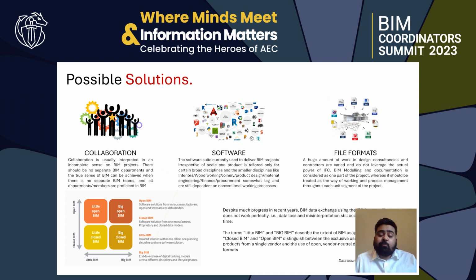So a big part of the problem is that the BIM execution plans or the design management plan that is laid down by the lead consultant or by the main contractor might not work for each and every discipline on the project, because the lead consultant or the client or the owner BIM department might not have the BIM professionals who have experience from all the different industries. And in most cases, what we tend to do is just to suffice the BIM protocol, to just suffice the execution plan, but not actually solve the issues in their own processes and in their own organizations.